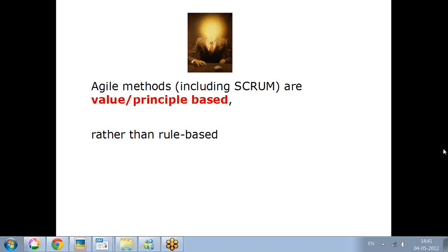But then you'll have to educate the customer very clearly: for this much scope and this much effort we are spending, this is the cost, and if it exceeds that, there will be extra charges. I think the best model would be cost reimbursable, cost plus fixed fee, or time and material.